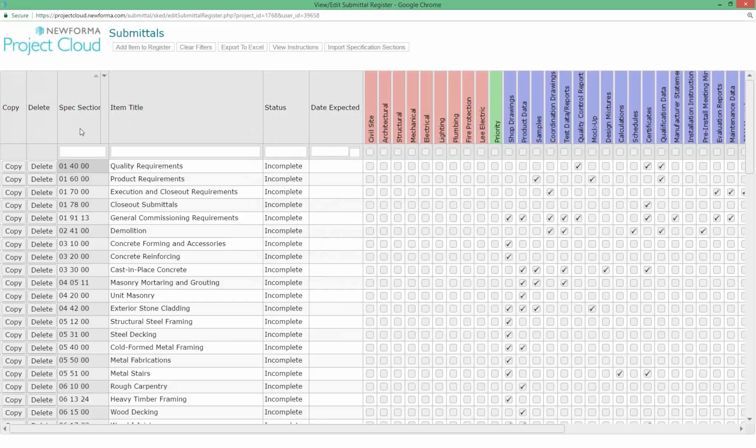But one way or the other, it's just a matter of saying, yep, here are the various spec sections for each of the submittals, and you put it into the spreadsheet, and then it gets uploaded in here. And I can modify these, you said? Yeah, absolutely. Usually for most projects that we have, I go by my standard CSI cost coding,